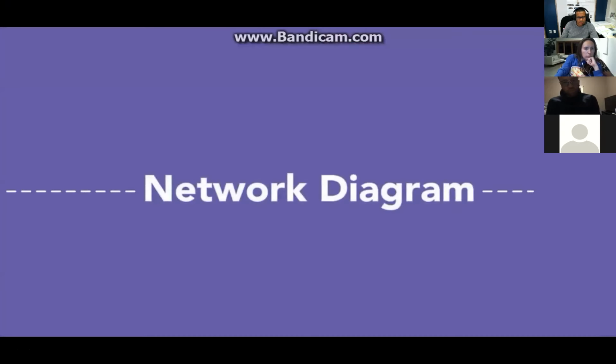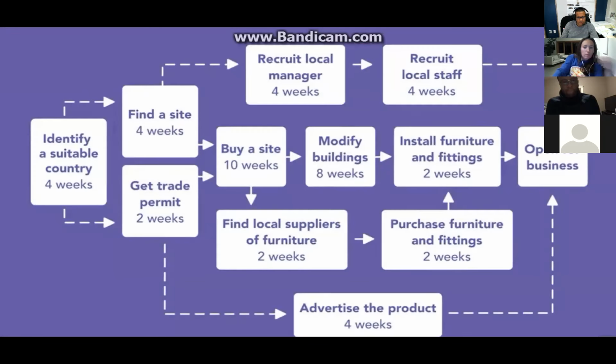Now, something that many people don't realise is that you can't really draw the Gantt chart unless you already know the critical path, because everything hangs off it. And the best way to get the critical path is to do a network diagram, which is one of these. Quite often produced using Post-its, but you could use a computer to do it. So basically, you find the critical path by just adding up the times as you go across. Computers do it by doing something really complicated called a forward and backward pass.